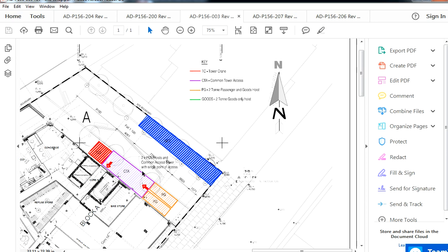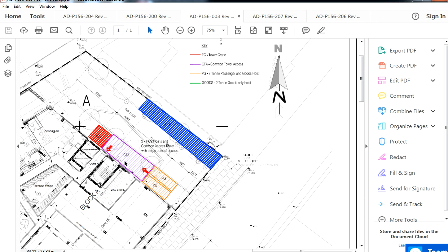So if you were to create a site plan, you would take into consideration that all of the accesses for the goods hoist will be in areas, either the hallway or the bedrooms, because they're the least used areas during the construction process. Okay, because the bedrooms usually would have less M&E works to do. Okay, so those are the considerations.